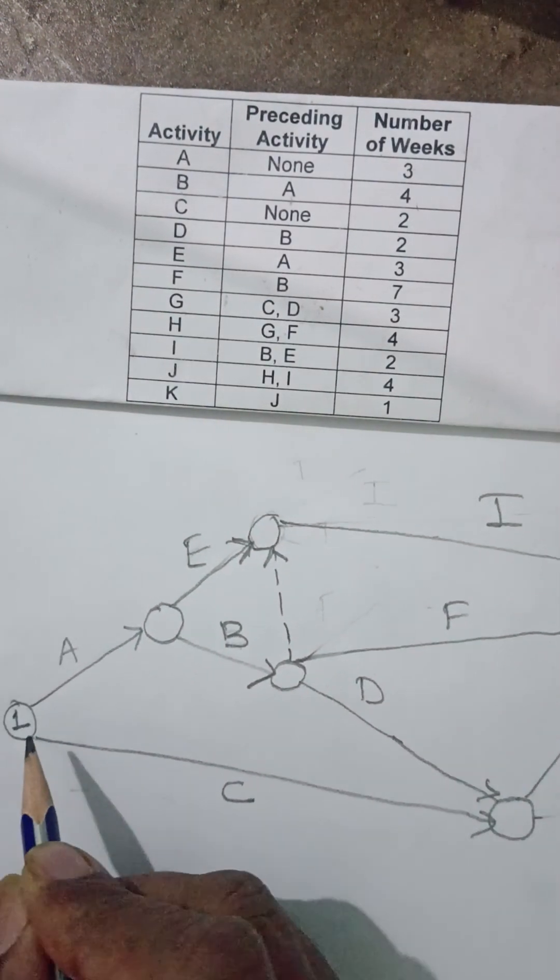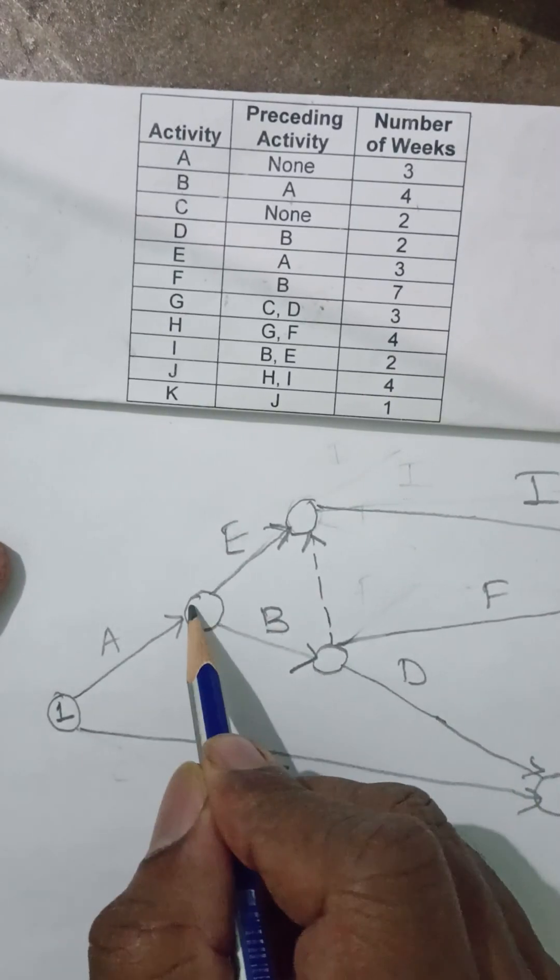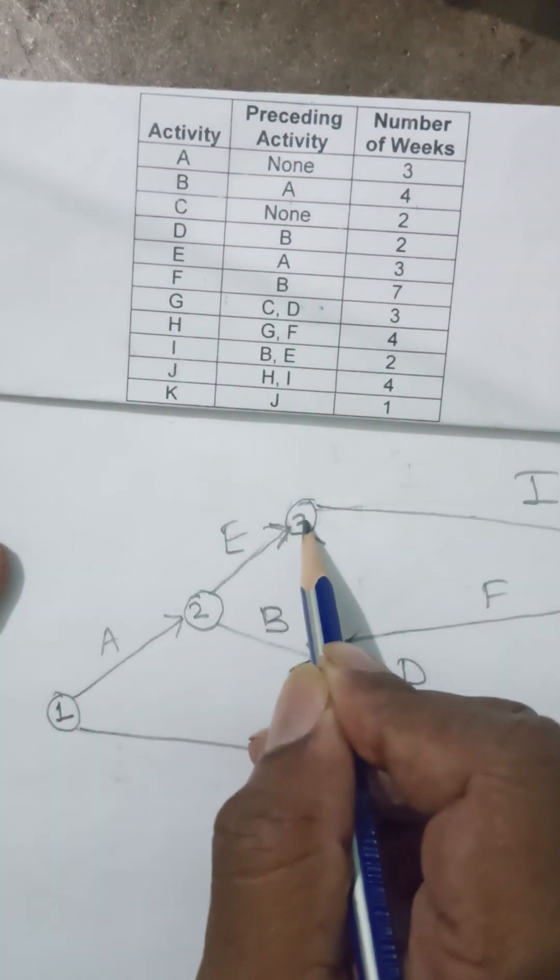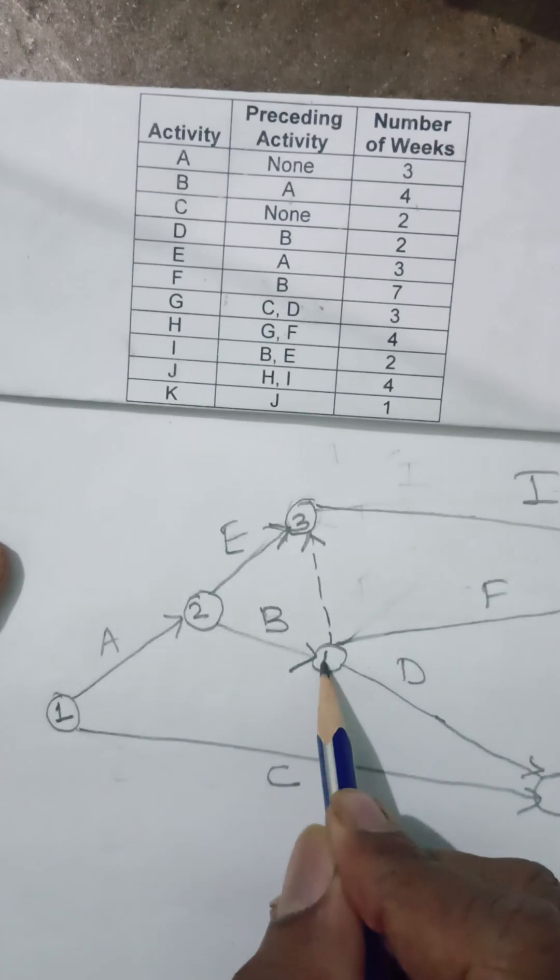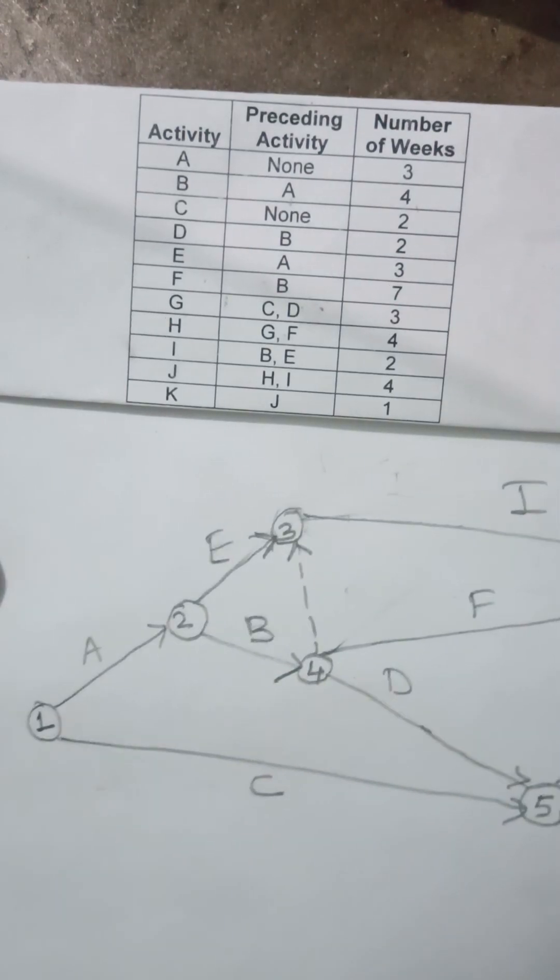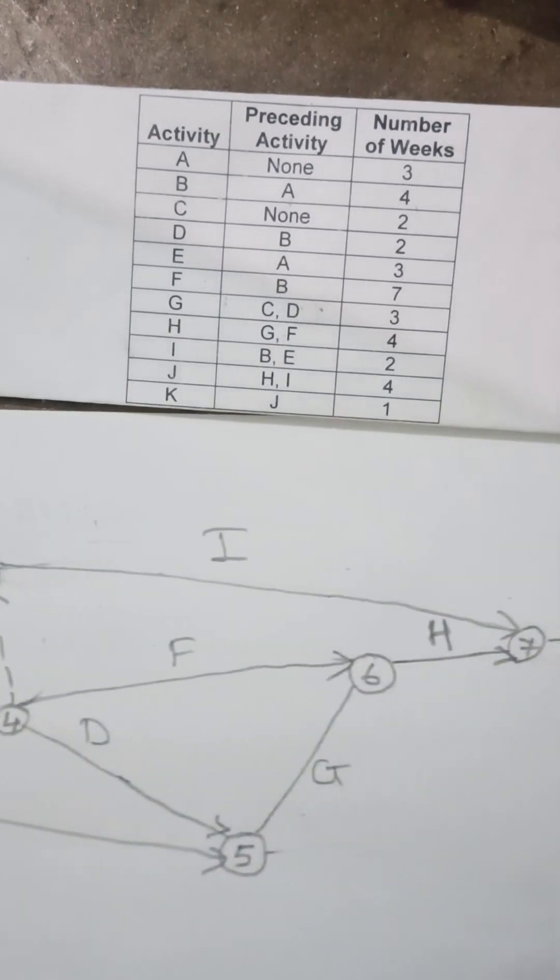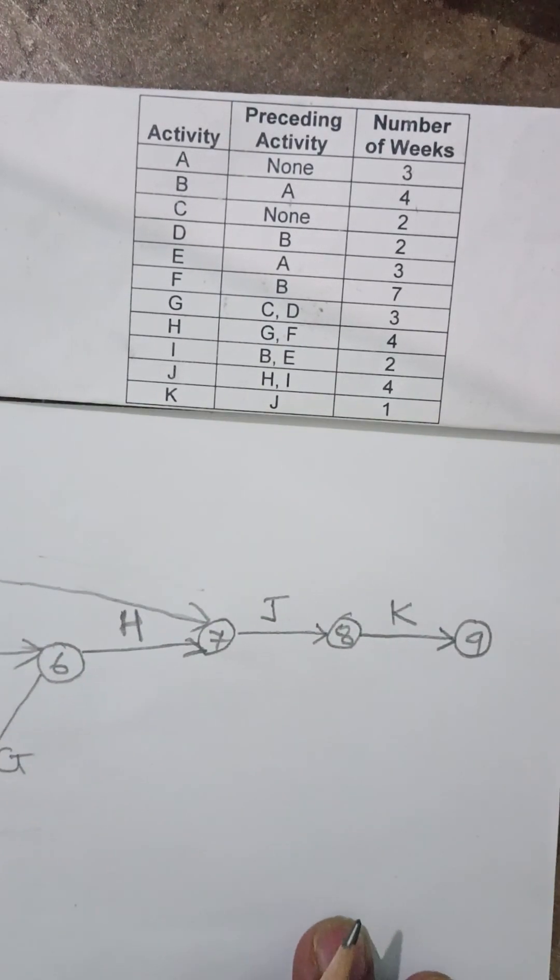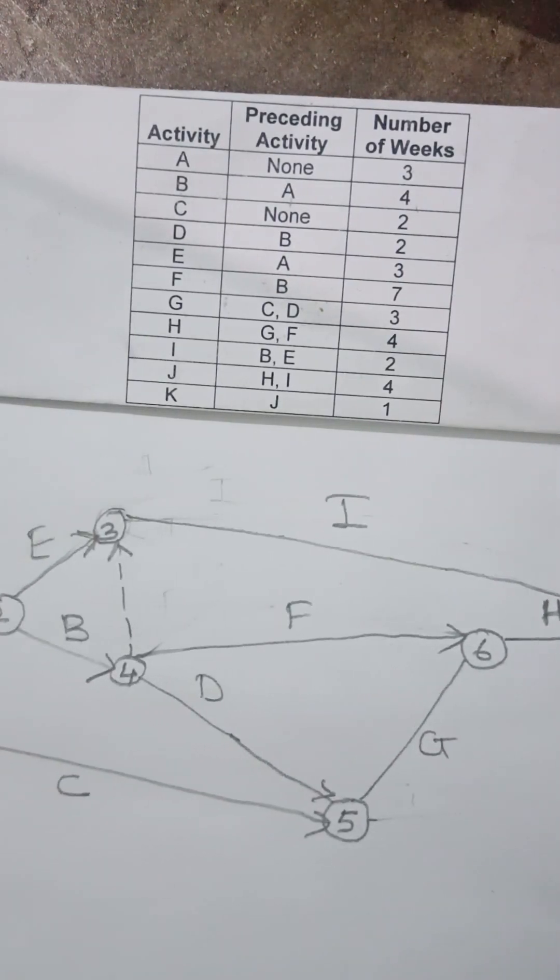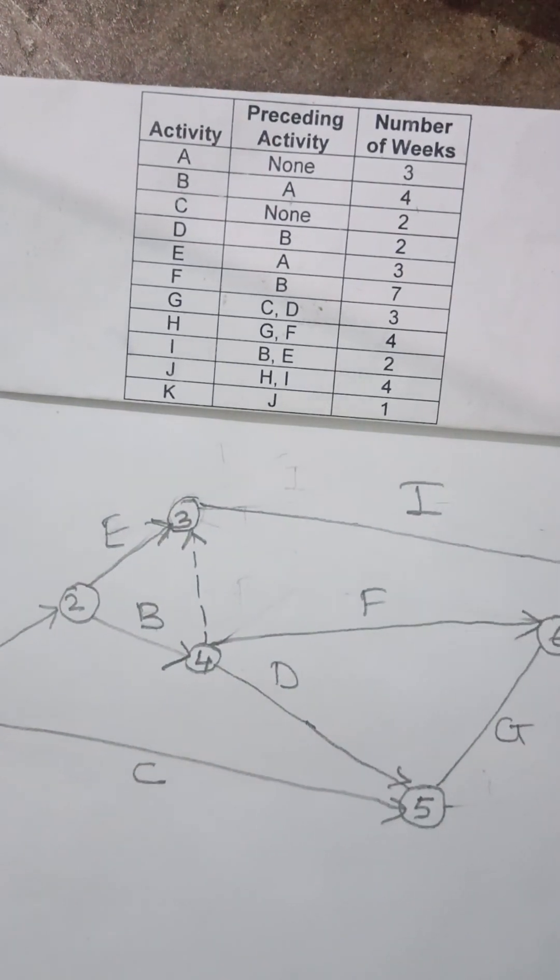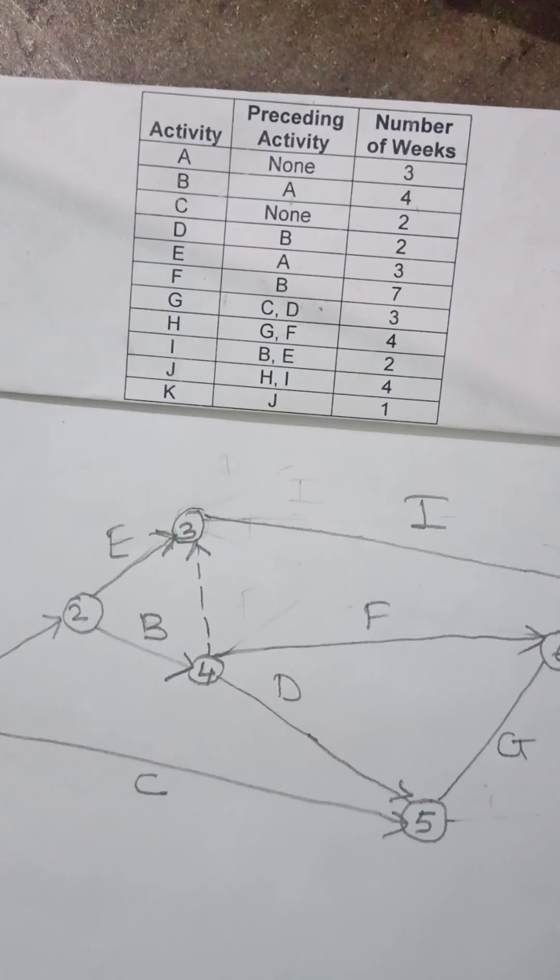Like 1, 2, doesn't matter you follow a different way, 3, 4, 5, 6, 7, 8, and 9. This is how I have given my numbers. This is my AOA network diagram.